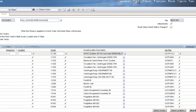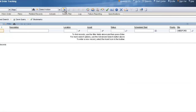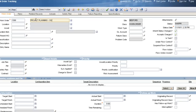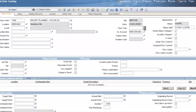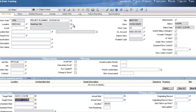To begin our project planning, go to Work Order Tracking and create a new work order. We'll call this Outage Q4, give it a higher-level location at the Needham site, and assign a work type of Capital Project. Now we'll add a job plan — the overall project plan called Project Planning Outage Q4. We gave it a Capital Project work type, added a job plan, and set Target Start and Finish Dates.